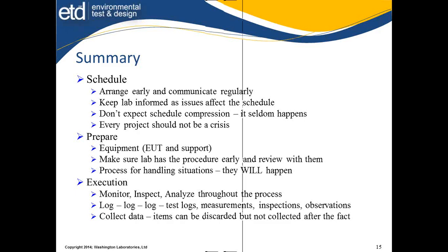What I like to ask all of our people to do is, when you discuss something that is part of the record, write an email, get a confirmation back that this is what everybody agreed. File it. Put it into the test record files. Okay? You should always consider this. Who records it, by the way? An email comes to five people within the lab. Who's the one that should be doing it?